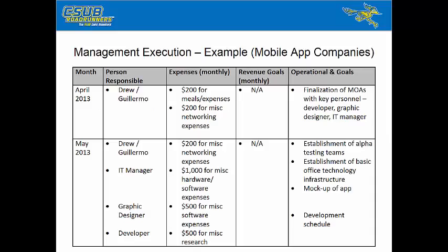So I've got an example here. You basically just want to make a chart. This is a project from a couple years ago that my students back in Cincinnati did. You want a chart with a deadline, the person who's going to do something, more or less what are the main costs that are associated with doing that, what revenue is going to come in, and then finally, what are the operational goals that you want to accomplish. So in this case, we were talking about building a new type of website, basically.